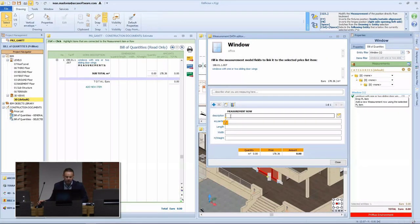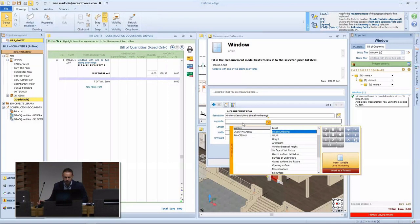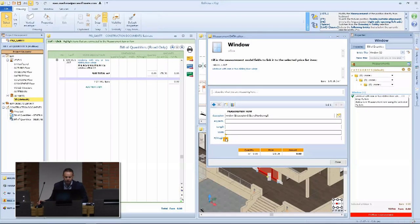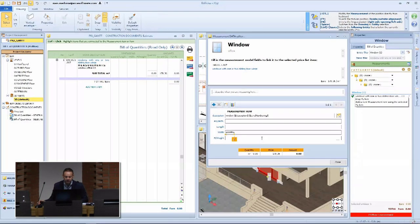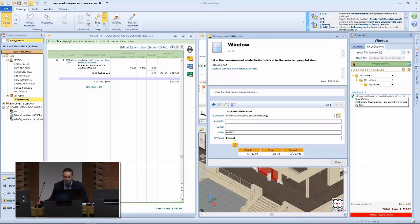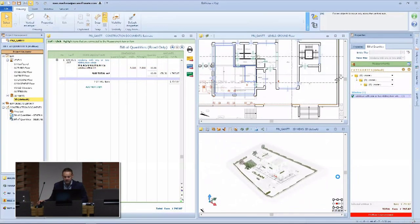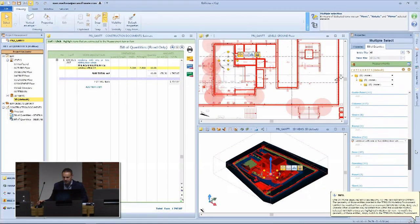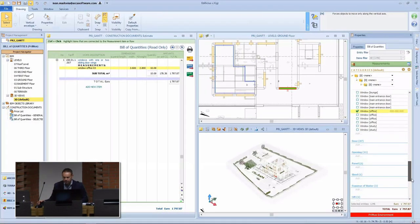We'll search for a specific item — for example, our window cost item — and a simple drag and drop over to the 3D element links it up. We can assign it to a category for organization of our bill of quantities. We can then acquire the metric information contained within the object itself. Since we're dealing with intelligent objects with their own properties — thermal, physical, mechanical, cost items — we use variables to read information directly from the object, such as surface, width, and height variables. If we filter down and select all windows, we can apply the same cost item to all windows in just one click.